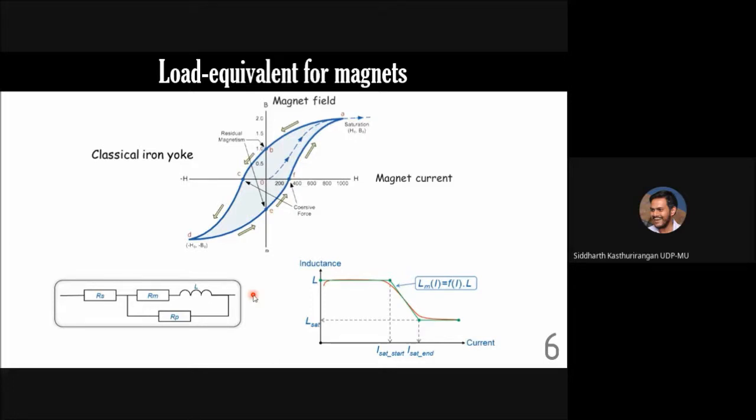And then once you have fixed all those things, you will take this equivalent circuit diagram for the magnet and find out the power dissipated through this combination. And then you will zero in on the power supply which you need for that magnet. Then you will let this be known to the power supply group. They will then tell the electrical group how much power requirement they have, and so on and so forth. As I mentioned earlier, it's a complex map.